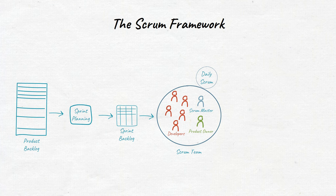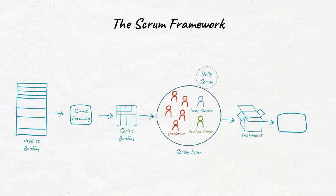An increment is a concrete stepping stone toward the product goal. The sprint review is used to inspect the outcome of the sprint as the Scrum team presents the results of their work to key stakeholders, and progress toward the product goal is discussed.